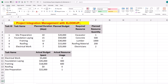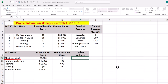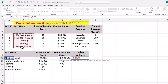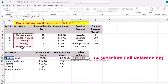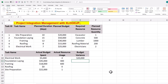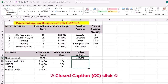To calculate the variance between planned budget and actual spending for electrical work, we use XLOOKUP in Microsoft 365. First, we specify what to look up — task name is our option. Second, we determine where to look for it — the array of task names is the place. Remember to press F4 for absolute cell referencing. Third, we define the range to return, which is the planned budget array. Finally, we deduct actual expenditure to find the budget variance for electrical works. We can duplicate the formula for other project activities.